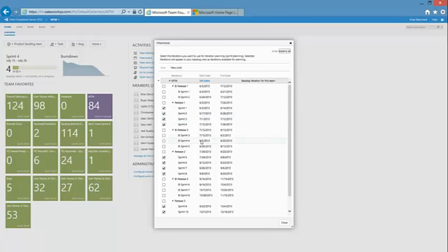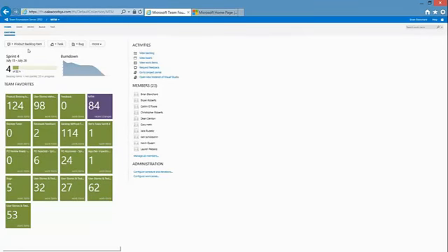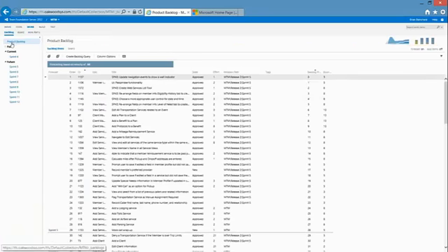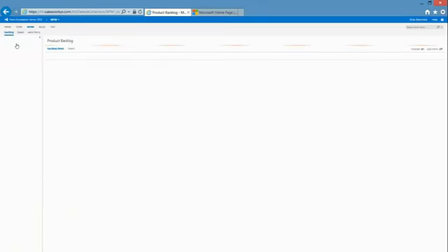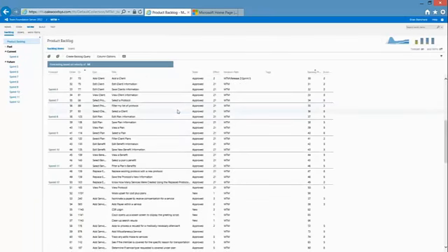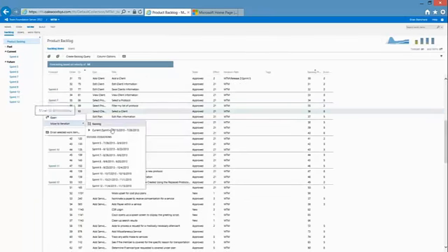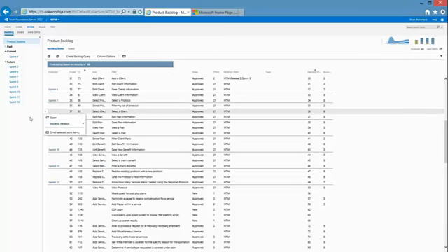So after I've defined my sprints, I would then go through and assign different product backlog items to those sprints. A variety of ways we can do that as well. But let's take a look at our backlog. And here's my product backlog on the top left. Anything that's not in a sprint, if I wanted to put in a sprint, I could just right-click it, say Move to Iteration, and pick which sprint. Now you'll also see none of these are prefixed with BI. This is context sensitive based on the fact that I am in the app dev team only. So it makes it easier for me to figure out where I want to schedule these things.